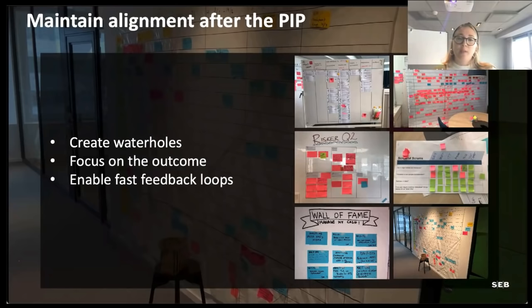During, for instance, a Scrum of Scrums, it's not about the different items that we planned that we want to continue having that alignment about. It's about the outcome, the PI objectives. So the questions I usually ask during a Scrum of Scrums are: do we expect to meet the PI objectives? Do we have any items being blocked? Do we need help? So focus more on the outcome rather than the output, in terms of what we communicated to our business as the effects, the outcome that we wanted to deliver. And then, how is that going?